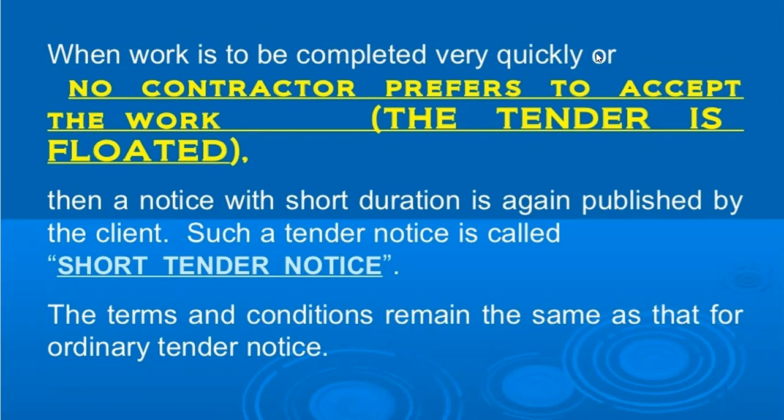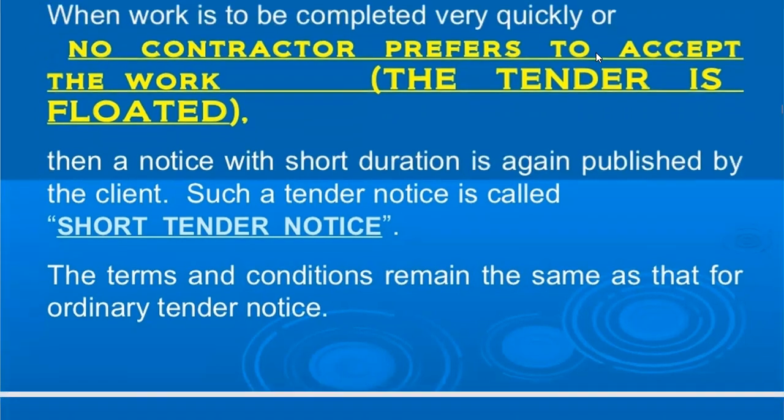If there is an open tender, a negotiated tender, or a limited tender, we talk about it. Sometimes the work will be completed very quickly, in a very short time. It happens sometimes that the contractor doesn't prefer to accept the work. So what happens is that the client publishes a short duration notice, which we call a short tender notice. The terms and conditions are the same as the ordinary tender notice, but it is of short duration.